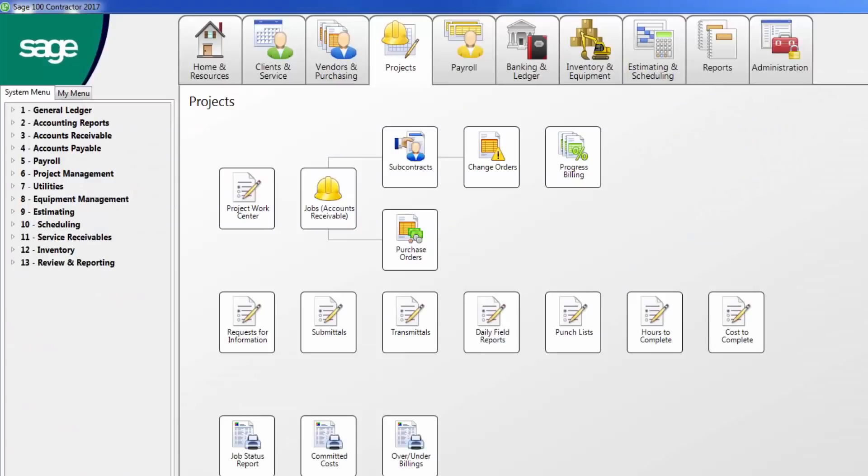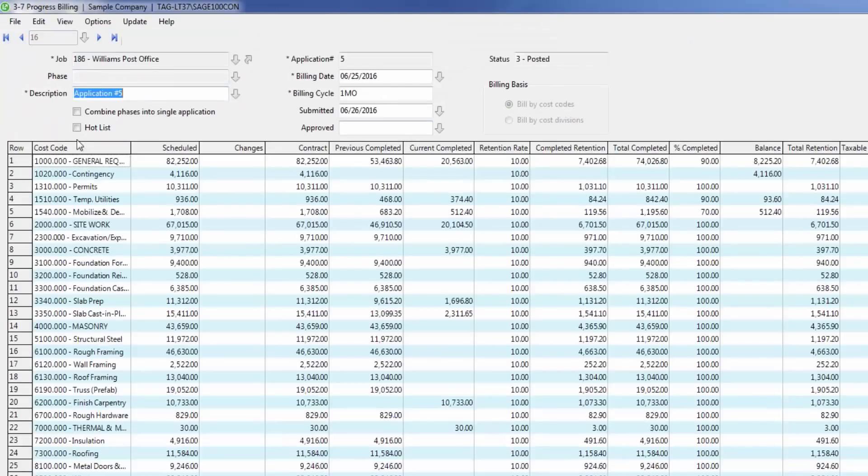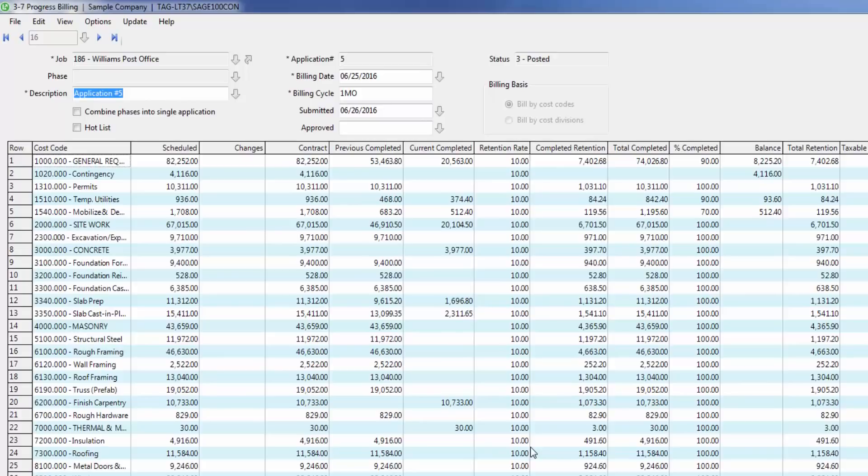As I mentioned earlier, the project details flow into accounting. Budget or proposal figures can be used to generate AIA formatted progress billings. As you can see here, when I go into the progress billings, I can pull up my schedule of values for a job and bill accordingly, also holding the correct retention that I want to.